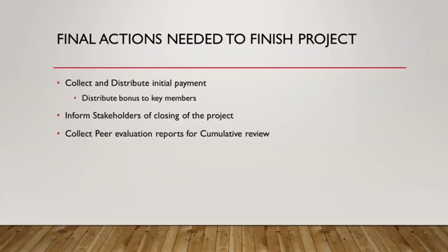And our final actions needed to finish the project are to collect and distribute initial payment. We could give out bonuses to those who participated more towards the project, those who had a greater part in the work of the project, and in addition to that, subtract payment depending on the participants' participation. Two, inform stakeholders of closing the project, because overall stakeholders hold a part of the company. And three, collect peer evaluation reports for cumulative review.